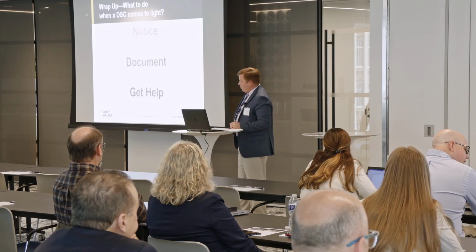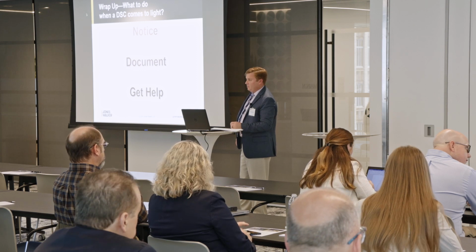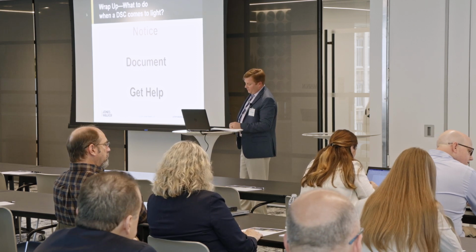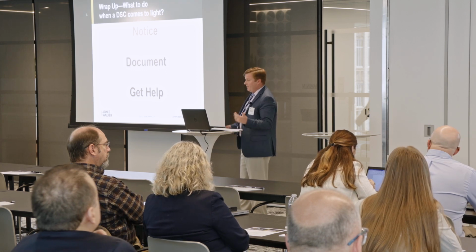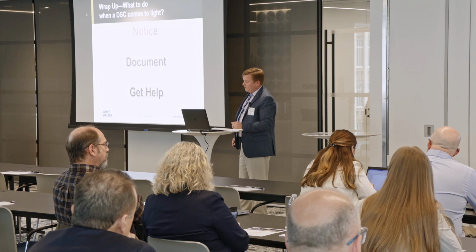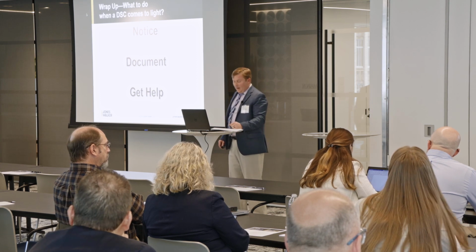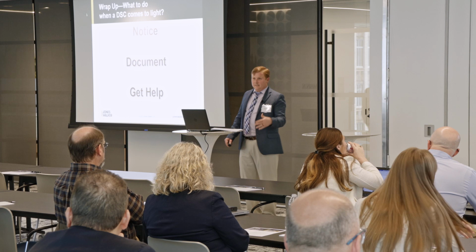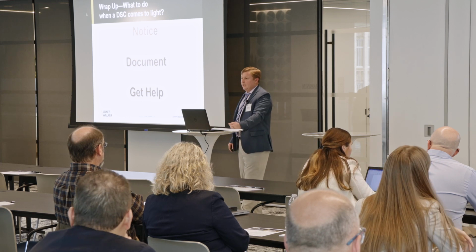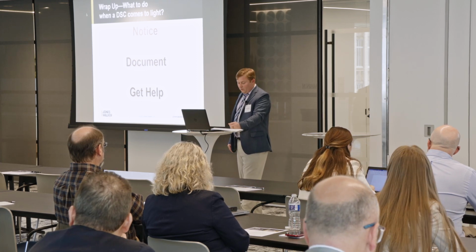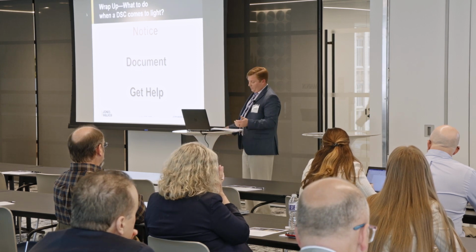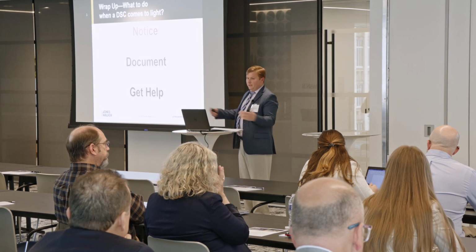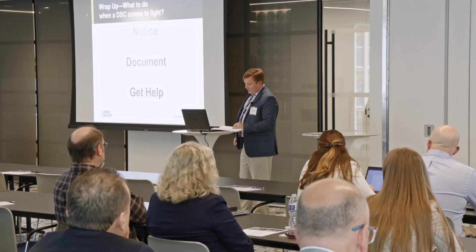So kind of to sum up, to try and avoid some of the pitfalls when encountering a different site condition, and this is from just the contractor's perspective, but basically provide notice. Failure to do so could bar an otherwise valid claim. Document, and in this instance, when we're talking about a different site condition, that's more than meeting minutes and daily reports. That means videos, photos, surveying, any other information that can be collected contemporaneously to later on support your claim.